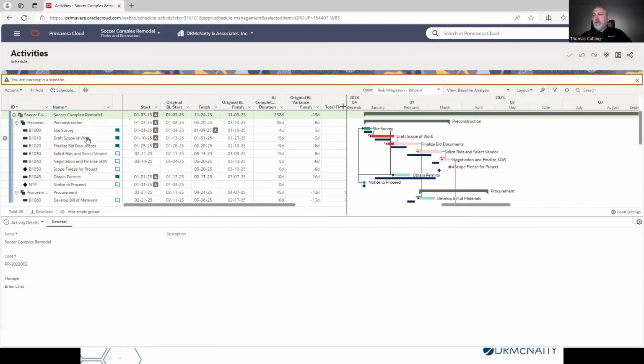This allows me to do, for a specific risk that is impacting the project, is go through and update the activities in a what-if scenario, so that I can say, okay, if we take these actions, if we add these activities, this is how it's going to impact the overall project schedule. And that can be reviewed and people can look at it and say, okay, that makes sense.